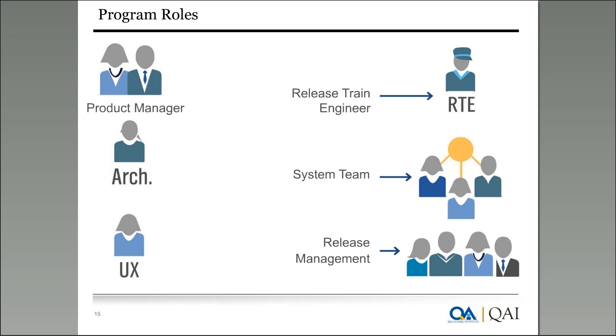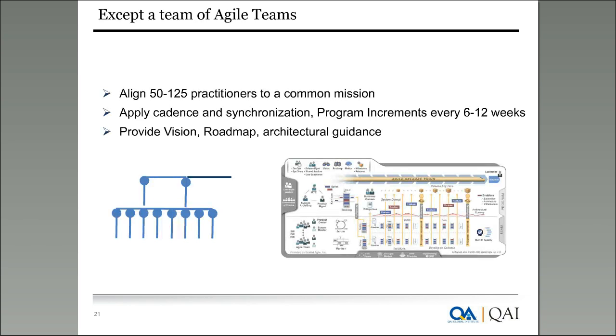So that means about 5 to 10 agile teams working together to deliver a program. Suppose there could be a case where an organization is working with 500 people. Then how do we apply this? Then we will have multiple agile release trains, each having a team of about 50 to 125 people. That is how one needs to scale.